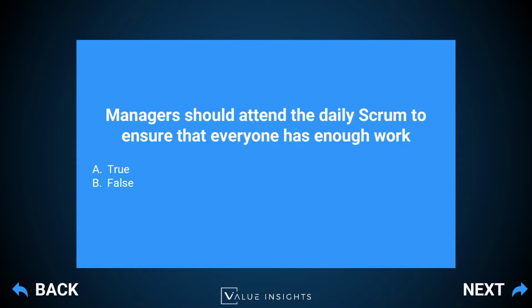They will likely disturb the flow of the daily Scrum, which again is for the developers to organize their work. What you want instead is that no one other than the developers joins the daily Scrum, besides maybe the Product Owner or Scrum Master, especially if they work as developers. That event is meant for the developers, and therefore managers should not be in. If managers were in, it would contradict the principle of a self-managing team. Self-managing teams decide how they organize their work and who is going to do what. There is no manager who decides this for them.